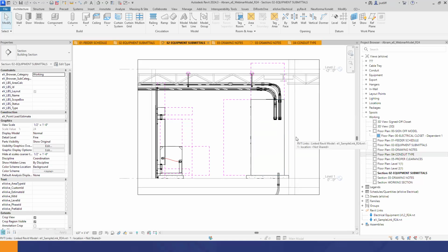But I would say, similar to developing your relationships with the shop, with your field team, the GF, having a good relationship with the PM and an understanding of why this stuff is so important will give you the leverage and the understanding of, oh, if I don't have this, I can't make progress. So then the PM would understand that it's a critical path element to push harder on to get at least a preliminary submittal.